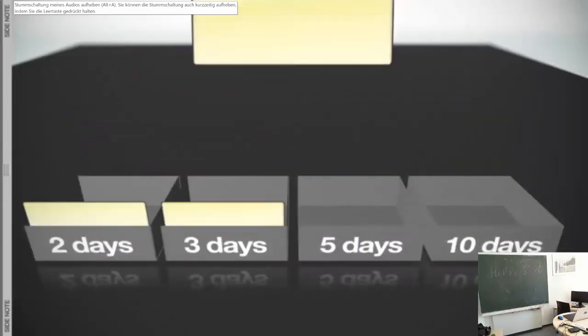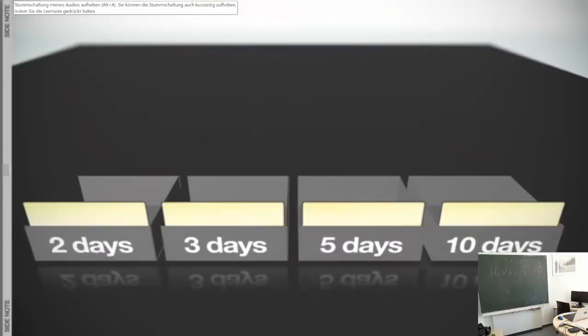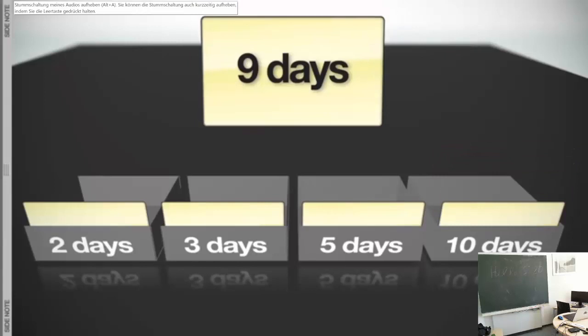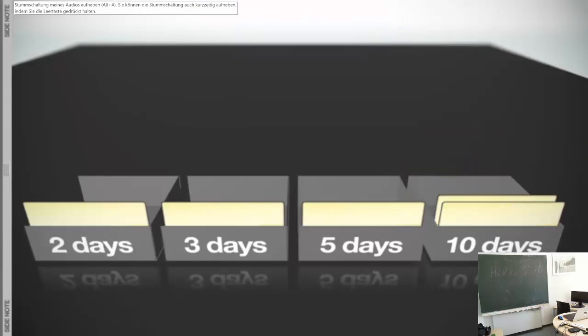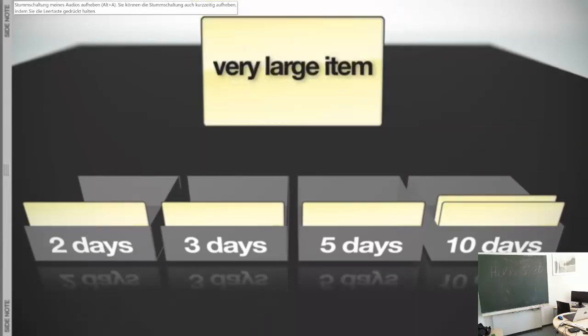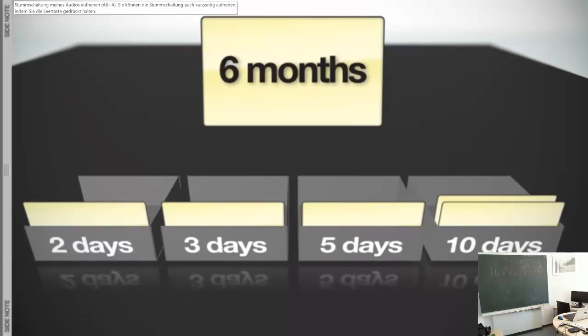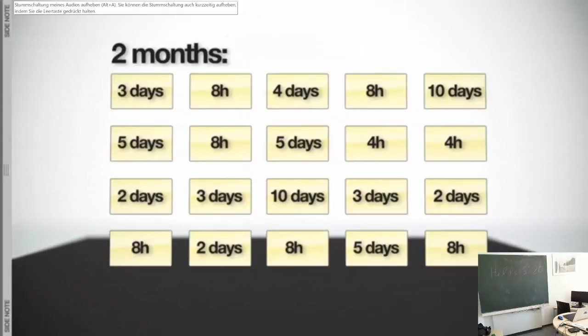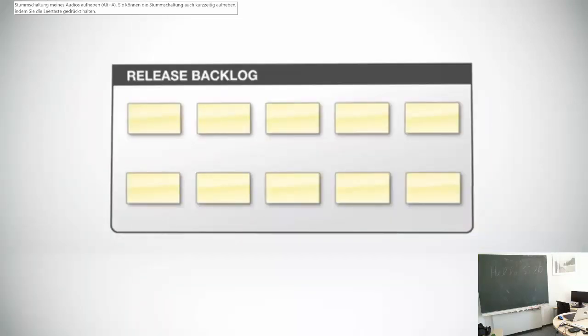Larger items will be estimated as two days, three days, five days, or ten days — all estimates in between fall into the next larger bucket. Extremely large items are similarly estimated in months: one, two, three, or six months. But such items will need to be broken down substantially before work actually begins. Now let's get back to the release backlog.